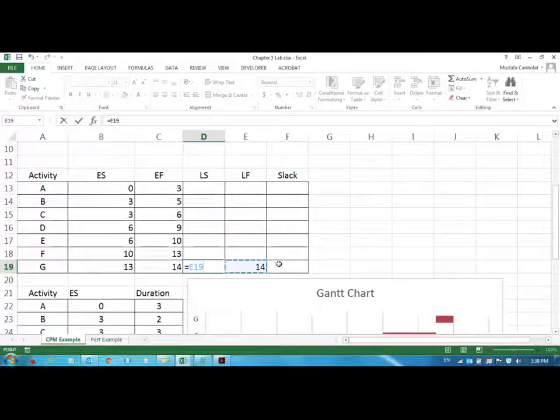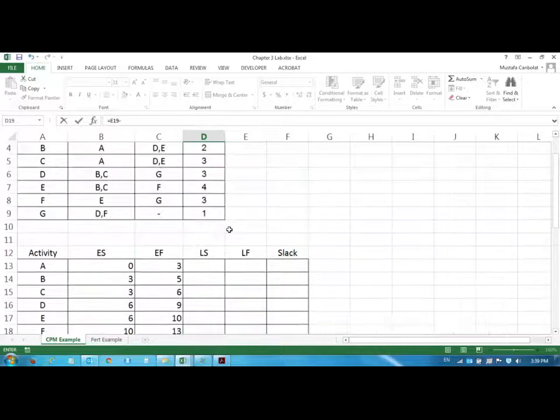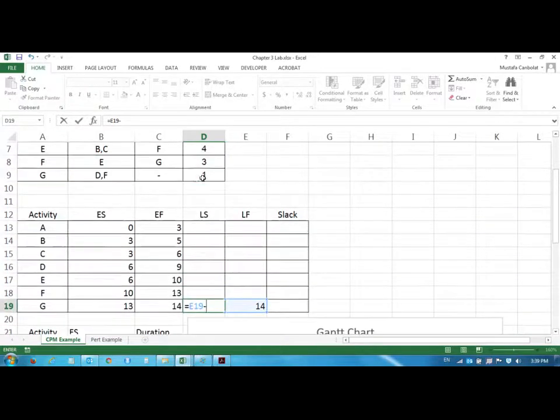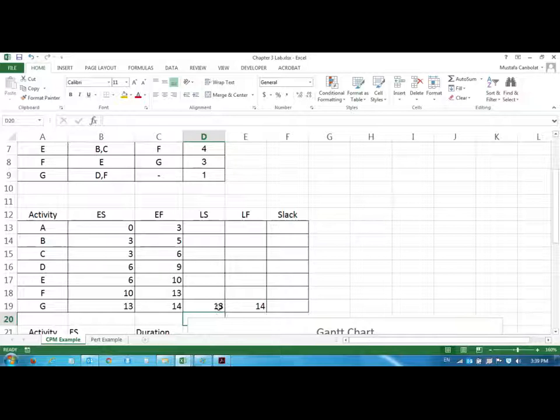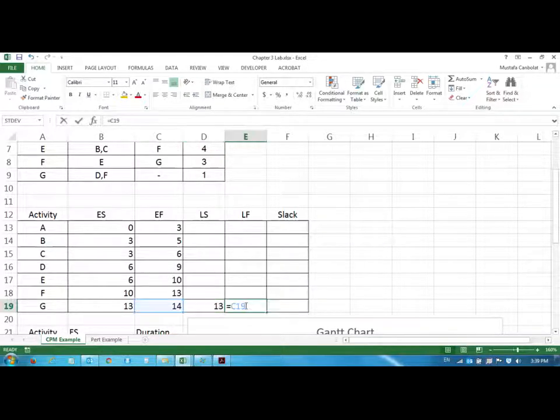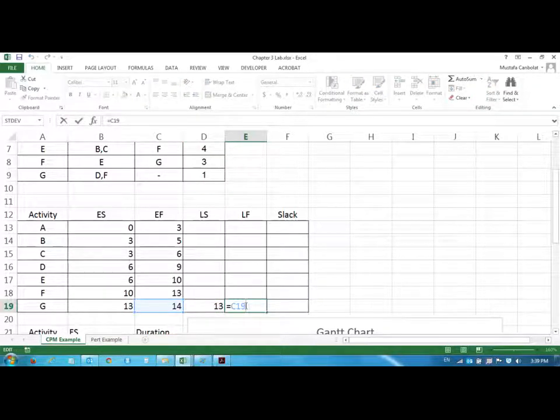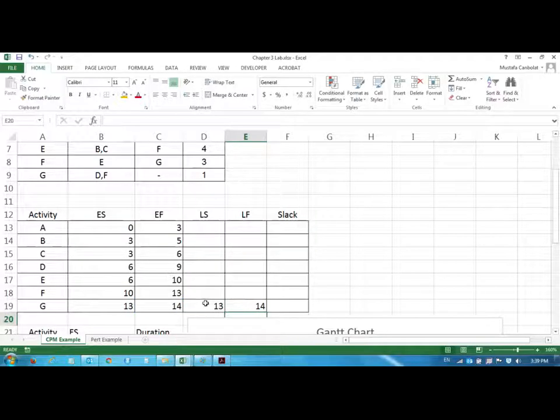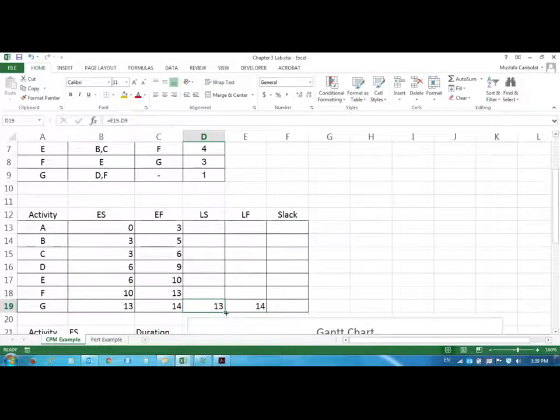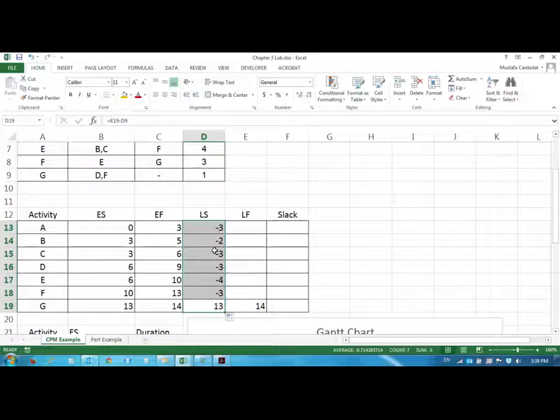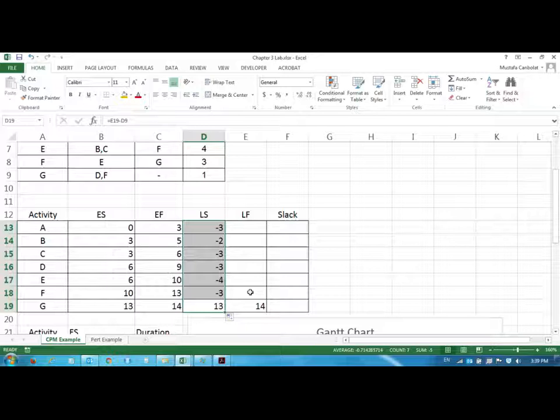starting by the late finish minus that duration. So the late start as an early finish would all be the same values you could just copy and paste the same formula. Whenever you have the late finish value the late start value can be found by just subtracting the duration. So I could just copy this to the top. Now these values are wrong but when we enter the values for late finish they'll be good to go.